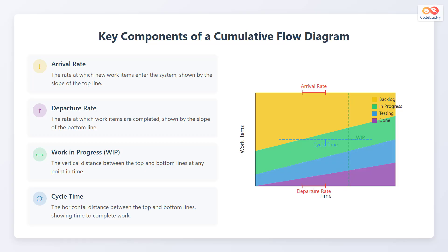Work in progress, abbreviated as WIP, is the vertical distance between the top and bottom lines at any point in time. Cycle time is the horizontal distance between the top and bottom lines, showing the time to complete work.